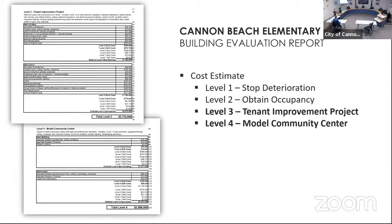Thank you. Let me then get ahead of you a little bit. Say a new roof on the gymnasium aspect. If we replace a new roof, we then are upgrading the insulation, and at that point, the seismic aspect is just a good idea. You're right, for sure. A seismic retrofit almost every time involves replacing the roof because you have to re-nail the roof sheathing or replace it.